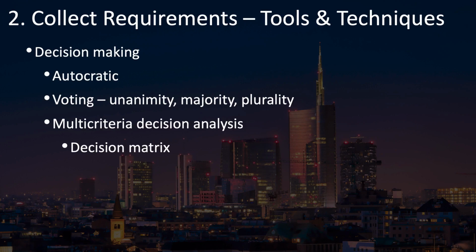You can come up with using voting, as you would in other circumstances, but then once you've agreed on the criteria, you can use those criteria to make decisions on individual requirements. These criteria can be put into a matrix or spreadsheet that can evaluate your measurements of all these different criteria and will help to generate your answers for you.